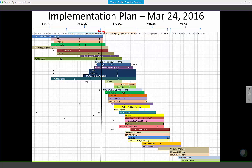two-thirds of the way down. If I get up and point, you can't see me, Dave. It's about two-thirds of the way down there. It's going in September. I know initially it went to two sites, and then the plan was all the coastal sites. There's a few things mixed up here. So the official implementation was to show it at two offices working properly. Right. Then the next month or two, which is underway right now, is to move the other 20 or so.